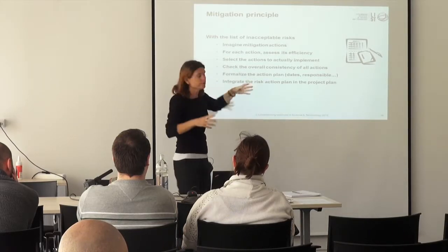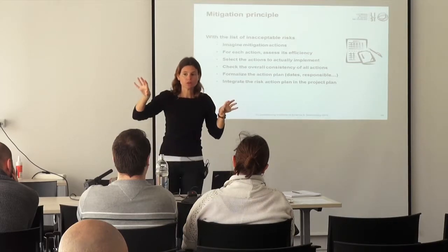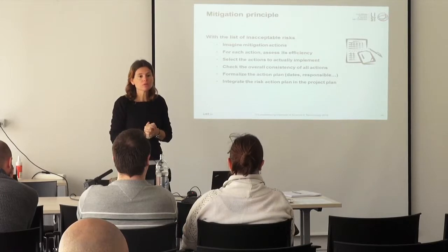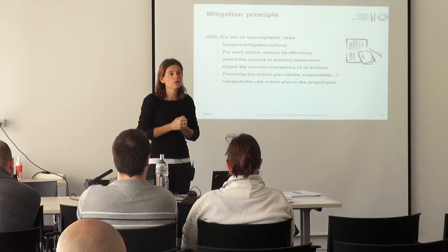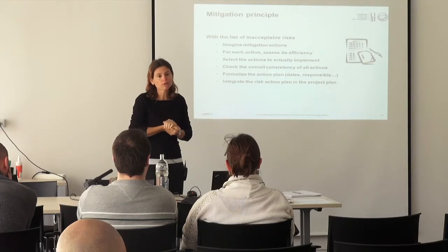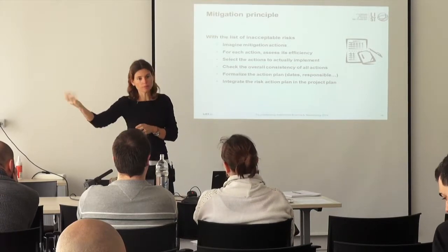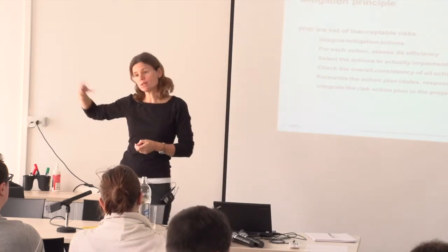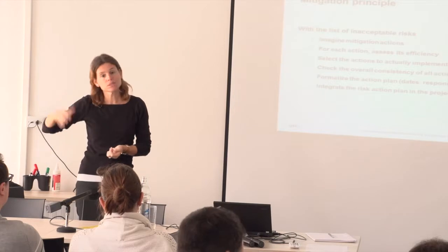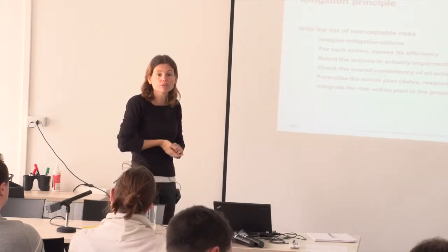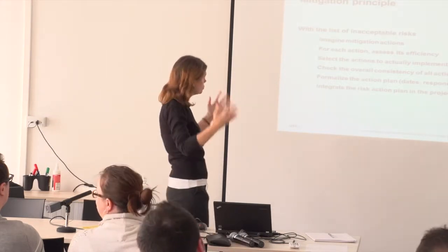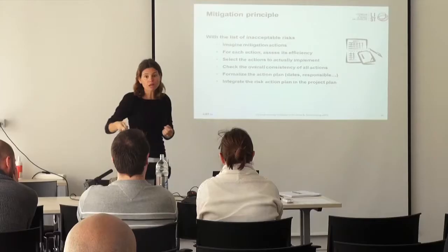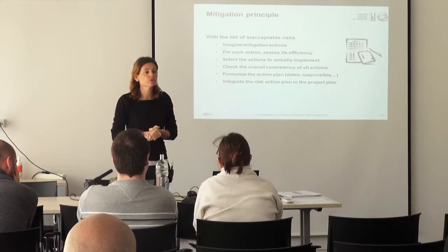Once you have decided for each risk, you check whether all your actions are going in the same direction. You cannot say, okay, for that guy that might be quitting, I'm assigning Mr. X as a backup, and then for some other risk, I'm assigning Mr. X to do something else, and Mr. X has this many things to do. That's not possible. So check the overall consistency of your action plan. Define some dates, define some responsible persons, and so on.